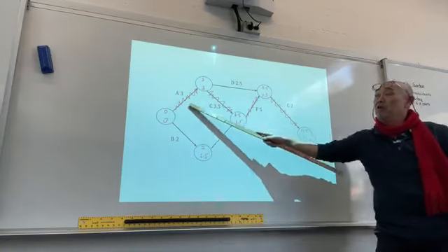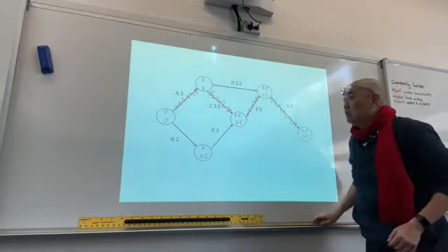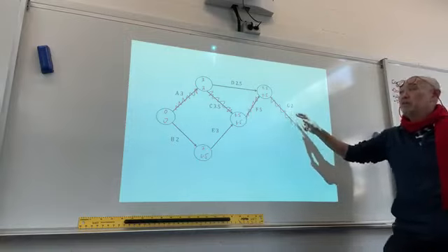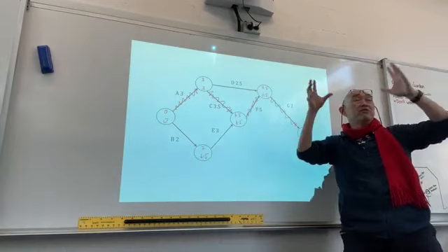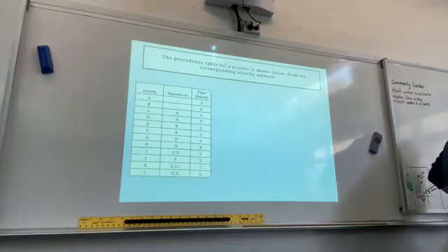So therefore, that's a critical path. There's no slack at all for that. For those 4 activities, A, C, F, and G, the 4 tasks got to be completed. There's no slack. Whereas those 3, there's some sort of slack time. Alright? Now, let's have a look at this.